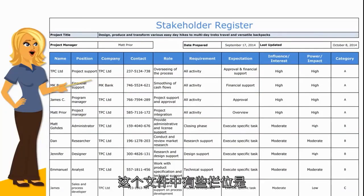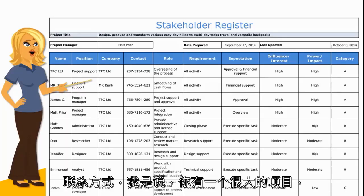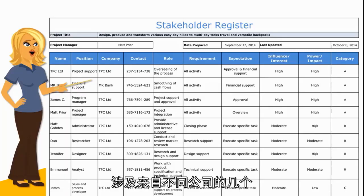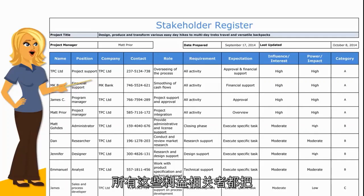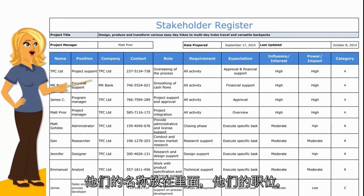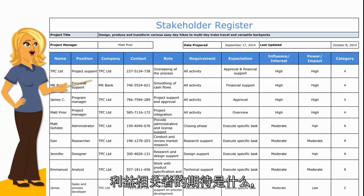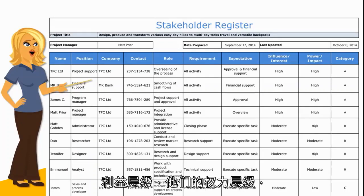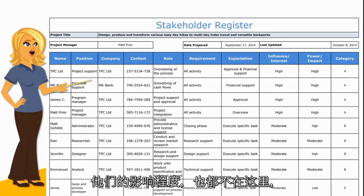Now, some of the fields in this document are the name, the position, the company, the contact. You've got a big project with several different stakeholders from different companies — you want to keep a handle on all these stakeholders. Put their names in there, their role, what exactly they're doing, what the expectations of these stakeholders are, what their requirements are, their level of interest, their level of power, their level of impact.